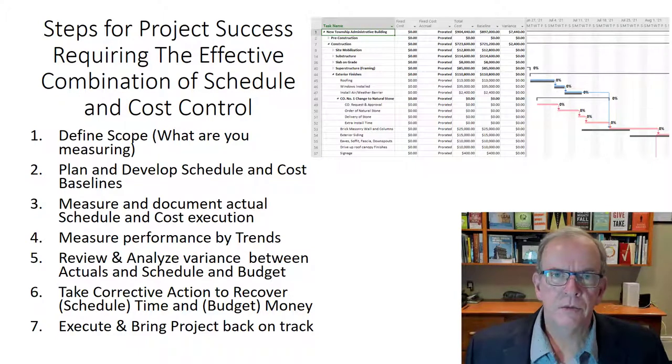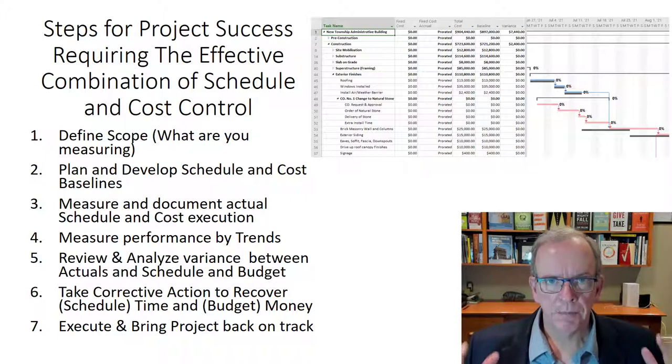So that means that we have to develop a baseline, which is the plan. And that's everything that we know at that moment in time. So when we're starting the project, what do we know about the project? What are our experiences? What was our estimate, which then is going to be broken into our budget? What are the time constraints that we're working within? And we develop a plan known as our baseline, a baseline schedule and a baseline budget.